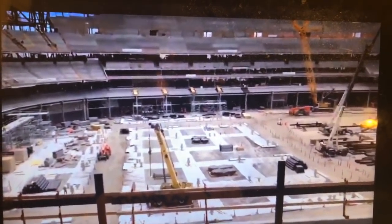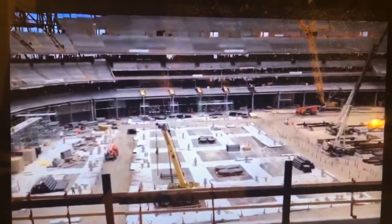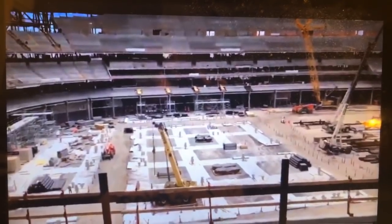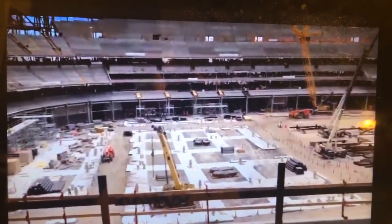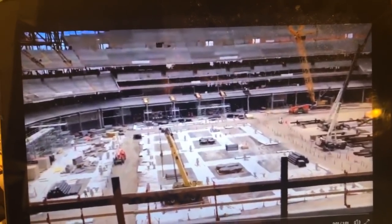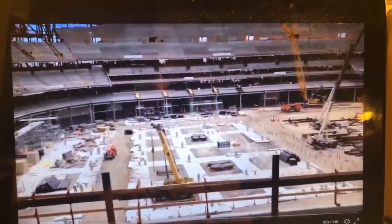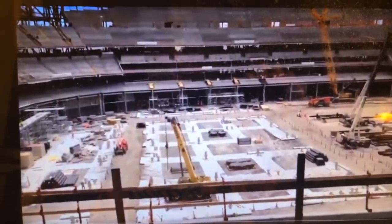Also, this is still open air, and after being decimated by something like 20 days of rains and hail and high winds, actually more than that, they finally have some calm with which to progress. Now, to what degree they are on schedule to meet the July 31st roof deadline, I don't know. I'm trying to find out. But let me just put it this way, folks. Sunshine, and I say this in part euphemistically, seldom reaches this project, okay? It does. Seldom reaches this project.